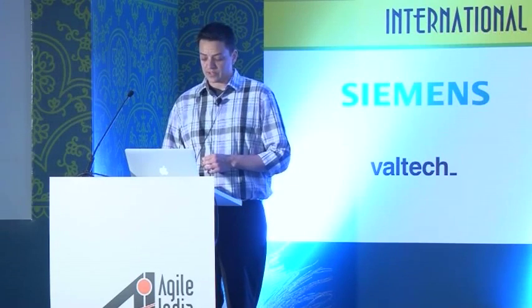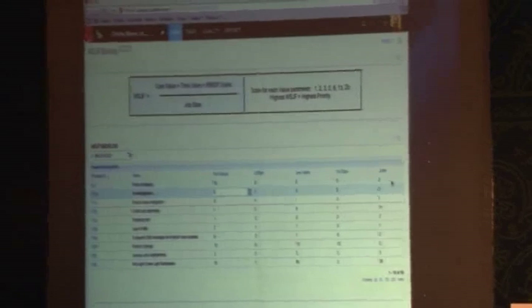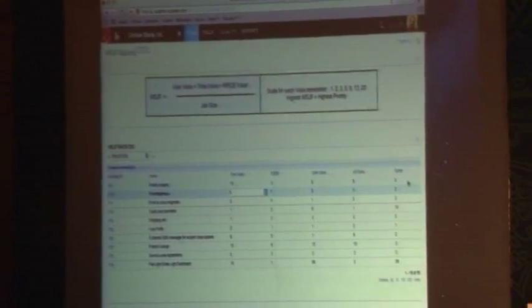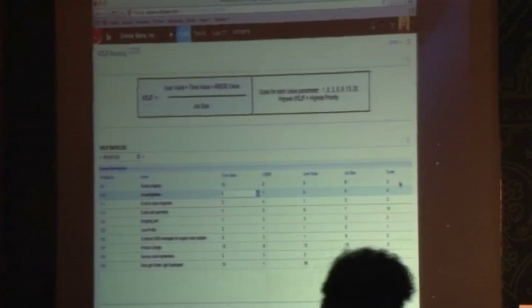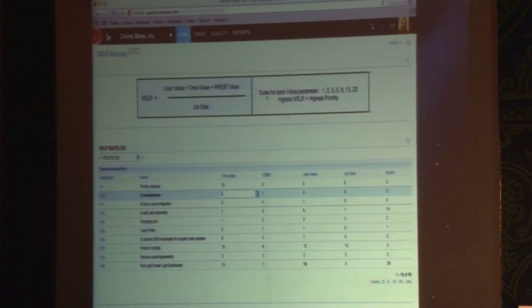If you like to do weighted shortest job first (WSJF) calculations, we have an app for that as well. On the WSJF backlog we can see all of our features and enter values for time value, user value, job size, and then derive the overall score. If we change any of these values, the score is updated on the right-hand side. The score is a custom field added to the feature, and through this app we can update it directly — it provides the calculations for you.